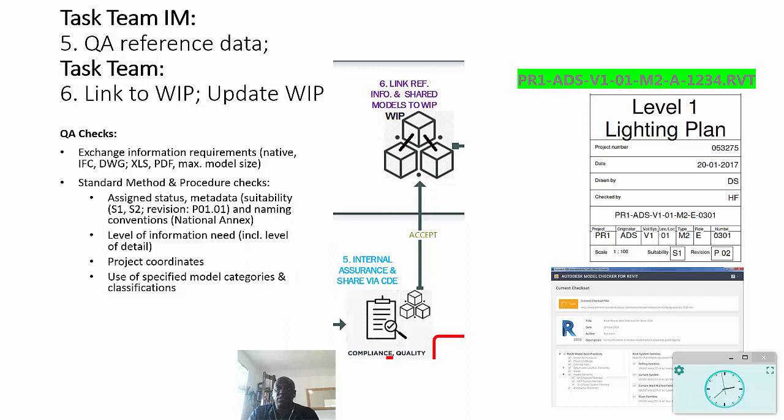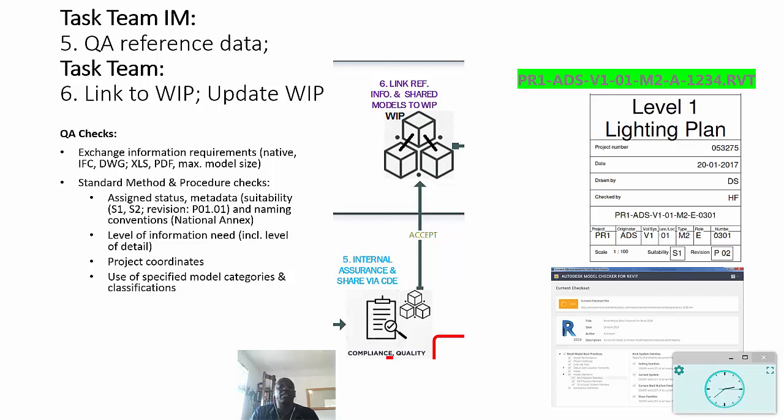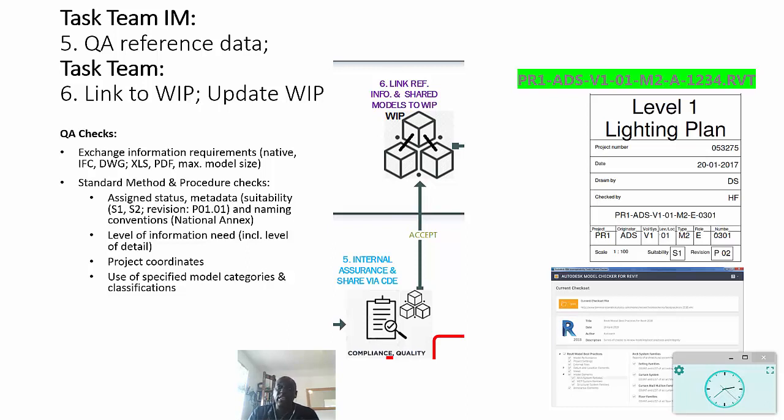Revision is how you share that information in sequences, and of course there's a naming convention. This is something that's normally described inside of the national annex. Remember that that information needs to be checked in connection with the level of information need, which as I said includes the level of detail. It needs to be spatially coordinated with the project coordinates so that we're not having to waste time trying to reposition the information - it should be in the right place in the first place.